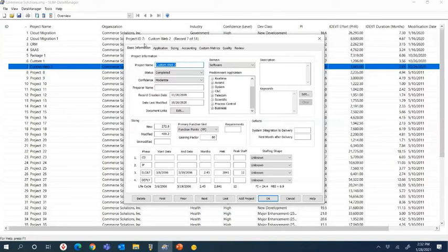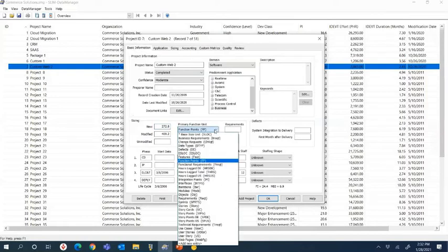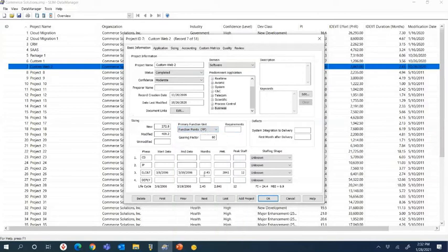You can see here on the Basic Information tab, we've captured the amount of work that was delivered. Again, this is a completed project. And you can see here we're using function points, but this could be measured in whatever type of unit you would like, whether it's function points or user stories or epics or business requirements, so we're flexible. We can set this up however you'd like. So how much work was delivered, and then we want to capture how much time and effort it took to deliver it, right? Like that slide I showed, the software production equation.